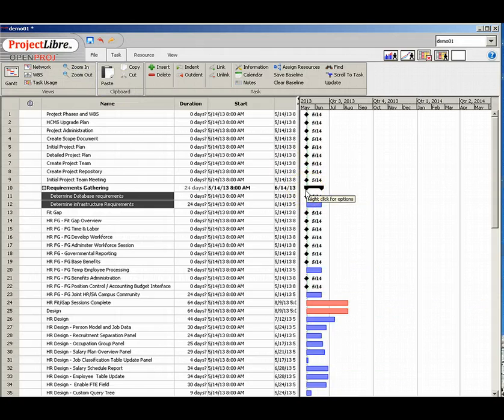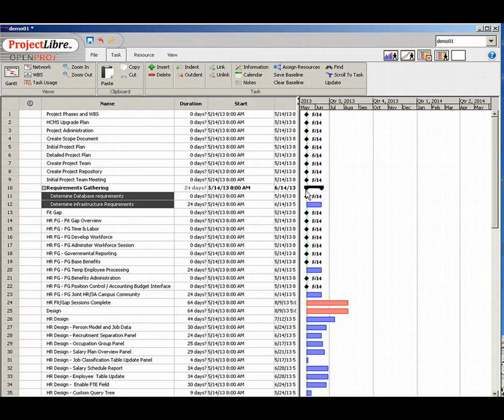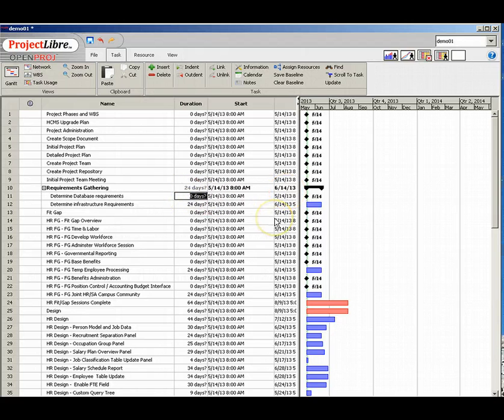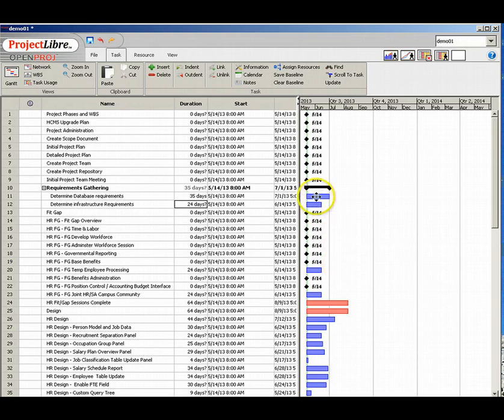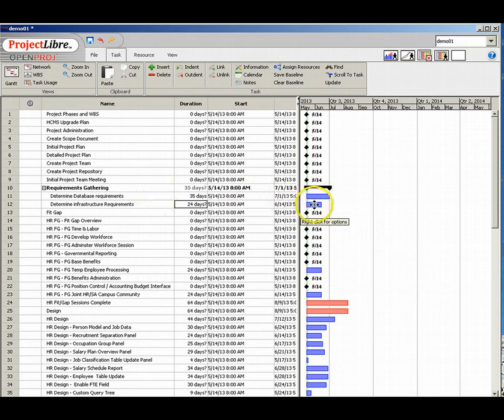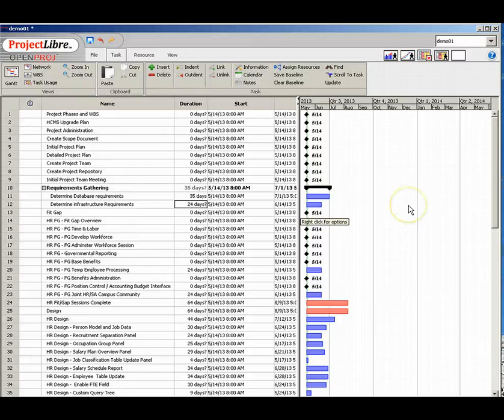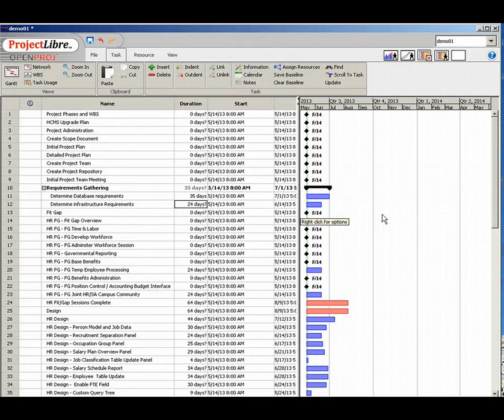We really hadn't fully developed the duration of days for each of our work breakdown statements, and we'll be doing that from this point on. So for example in determining database requirements we have zero days, more likely it's going to be in the area of 35 days. We just type in 35 in duration, and we'll see that the bar is automatically adjusted. You'll see that the sum of the two work breakdown statements under the phase of requirements gathering equals the length of all individual work items underneath.